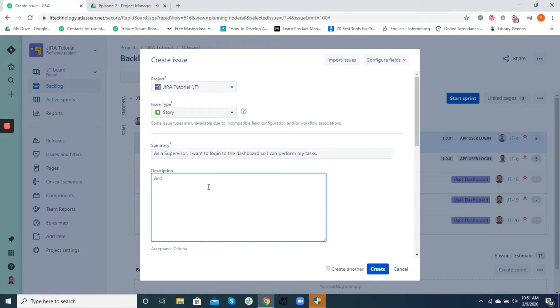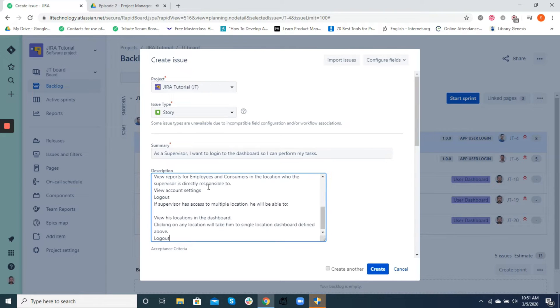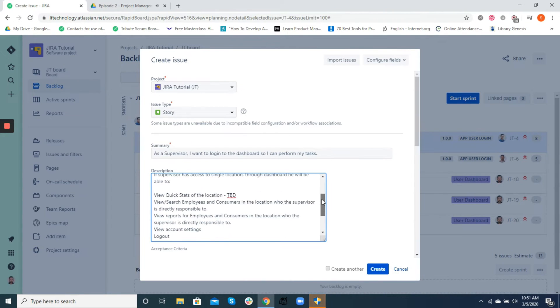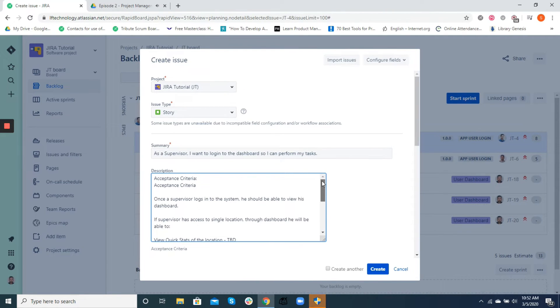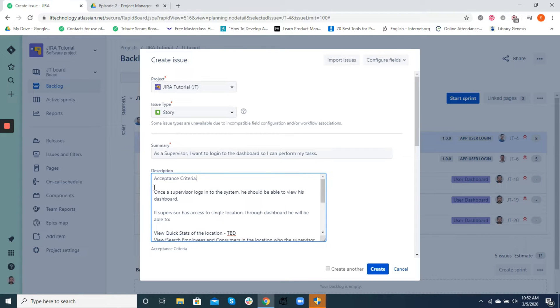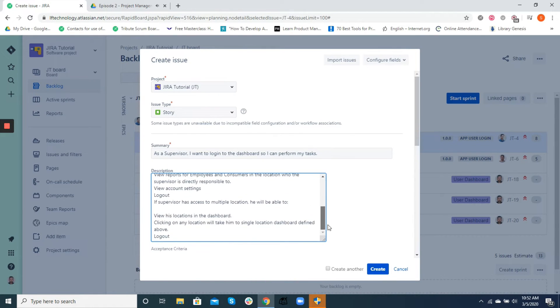The description field defines how we can achieve the objective that is outlined in the summary section above. We usually include a well-defined acceptance criteria while writing the description. This helps us define the definition of done, which is also validated by our QAs during the testing process.